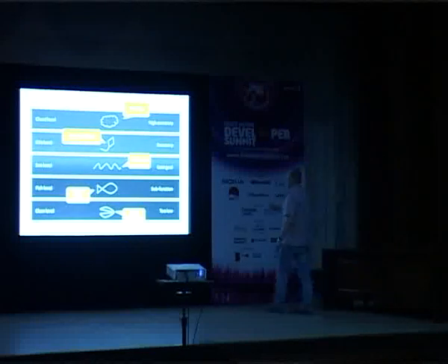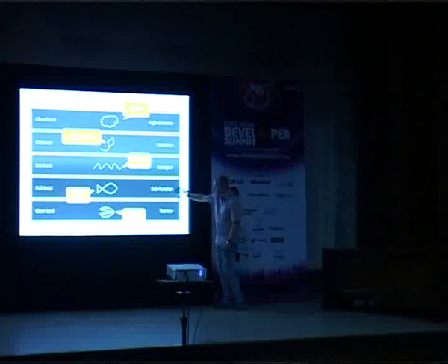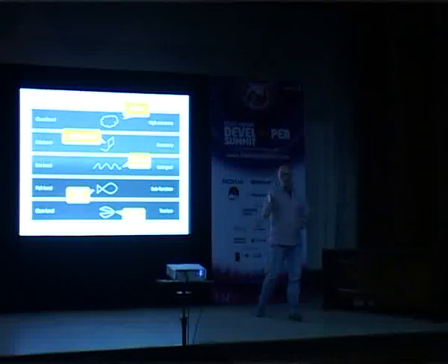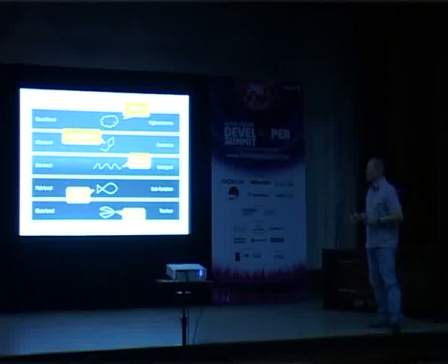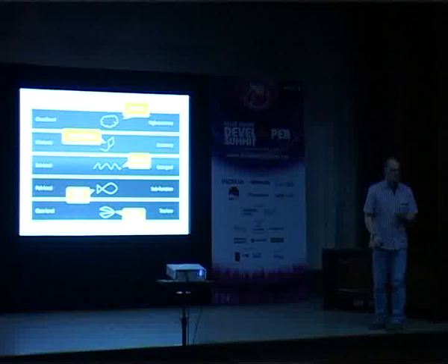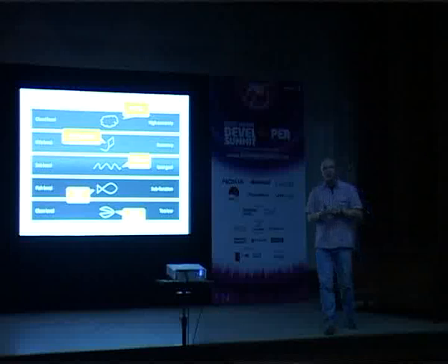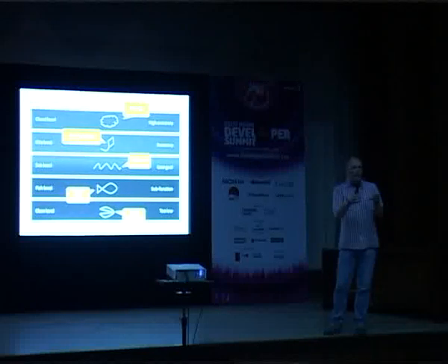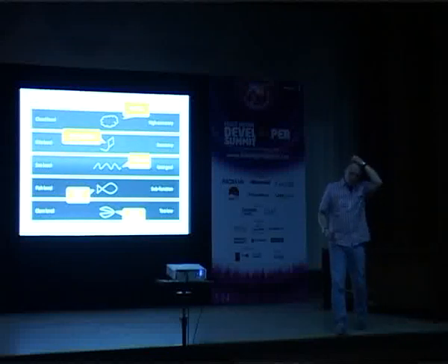So then we said, if we have the use cases at this level, which are the regular traditional use cases, we can model them down one level deeper. By doing so, we end up with a whole bunch more use cases, and I'll show you some models in a few minutes. There are more use cases than you would traditionally have, but they're all a lot smaller. And due to the guidelines we developed over the years for modeling these smart use cases, we've seen that they're sort of equally sized, which means you can estimate them much better and implement them much better in iterations.